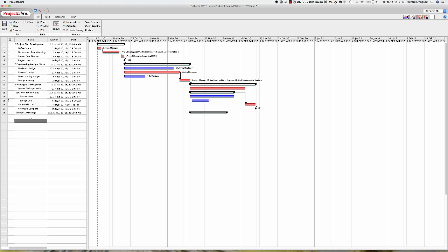So at this particular moment, and we're talking about this milestone right here, we're talking about project launch. If we are on schedule and everything comes together on that date as it should, then if all the dollars even out, we're on budget. If, let's say, it took the project coordination a little longer, and it actually took the department team meeting, maybe let's say 7 days instead of 5 days, we've lost some money on that particular project task. In other words, it ended up costing more than we thought. Plus, it will push the project off to the right. So the engineering design phase cannot begin until project plan development is done. And so not only did it cost us more money-wise, but it also pushed the project out longer, which could have a deeper impact somewhere else down the road.